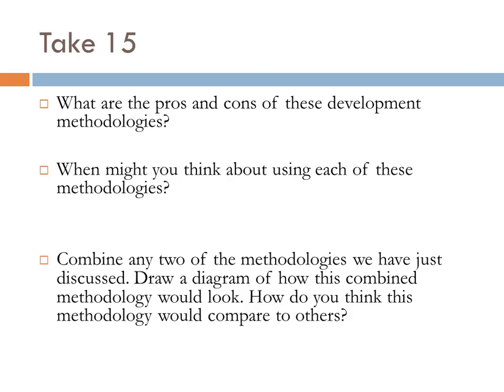There's a table in the book about selecting criteria for each method, and this wasn't mentioned, but would your financial restrictions have anything to do with it? Is one method cheaper than another one? That's a very good and also a very difficult question to answer. Mostly because it's somewhat easier to do with the structured approach, because you have a very clear scope for the system, a timeline for the system, right? So with the structured approach, like the waterfall, you can sort of say, well, this is the scope of the system. Once we have this set in stone, we know it's not going to change.